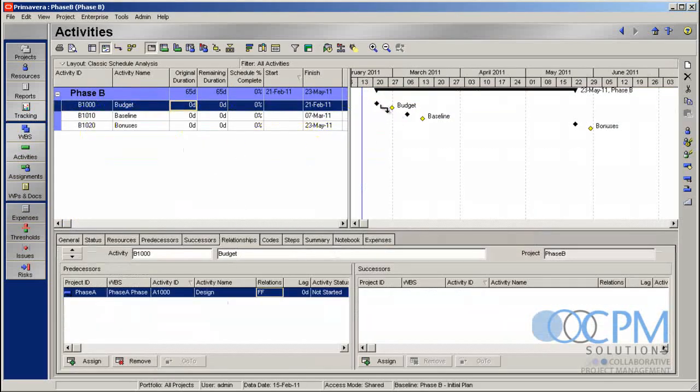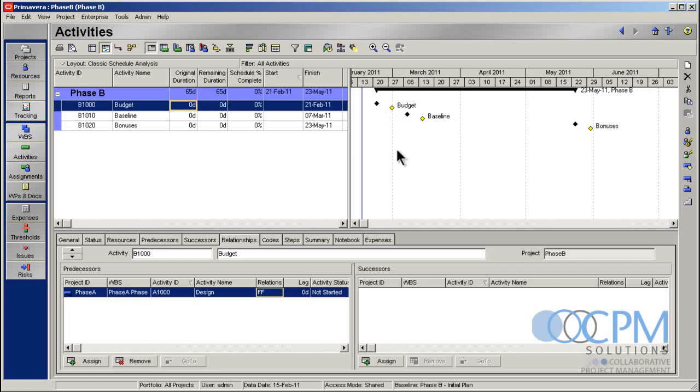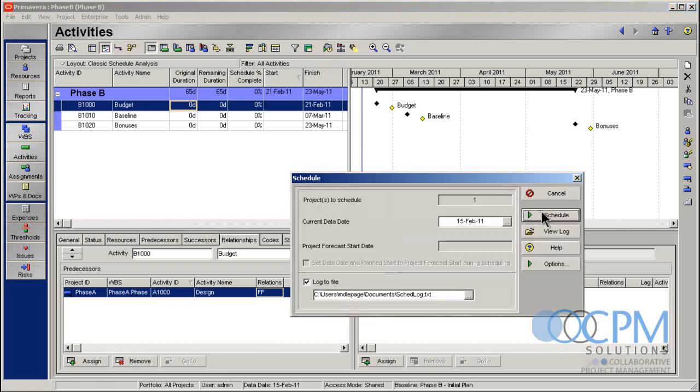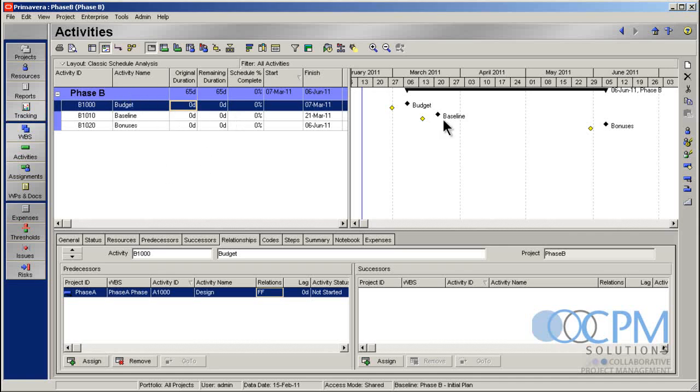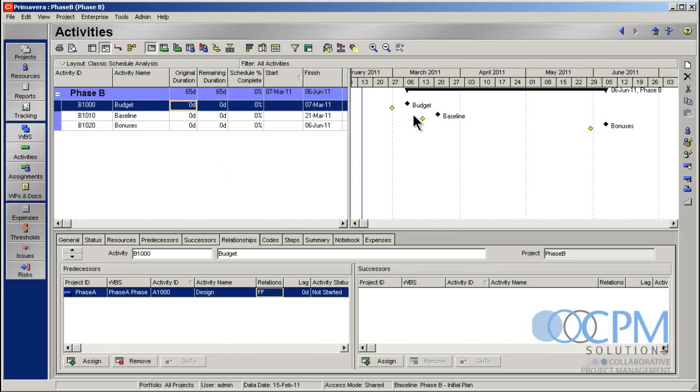To me, these are the same dates that we had before when I had changed things down to five days. But if I reschedule this project on its own, what do you think is going to happen? Let's find out. Exactly right. If you guessed, Primavera picks up the changes in the other project, even though it's not open automatically. So I can control here through the scheduling feature when this project picks up those updates and whatnot. So this project gets reflected when it's scheduled based on the other project. Now this is really very nice functionality to have. It's nice that you can control when you hit the schedule button. It's nice that you can set a baseline and see how things have shifted and whatnot.